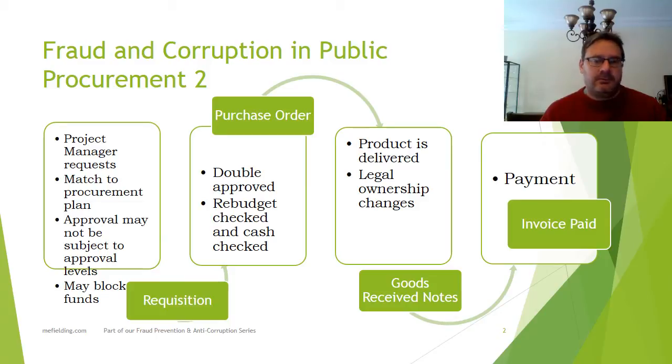So stage number one was the requisition, where we got our documents and we kept a copy of the requisition in the original requisitioning department, and a copy was kept in the procurement department. Your purchase order now goes to 3 different places. One of those is the supplier. The supplier now sends the goods, and those goods are actually delivered. Right, that is an absolutely critical moment.